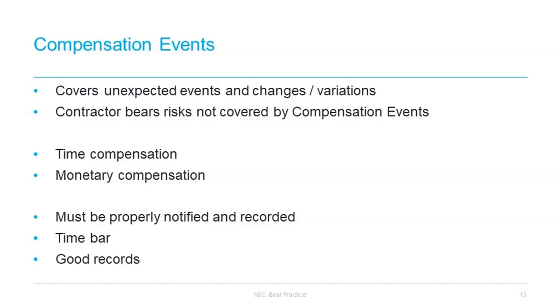We would encourage contract operators to take care when looking at what the most appropriate compensation event is to notify. Is it that the project manager has changed works information? Is it that the project manager has not made an instruction or done something else? And try not to lump all events under the simplest compensation event, as that can open it up to challenge.